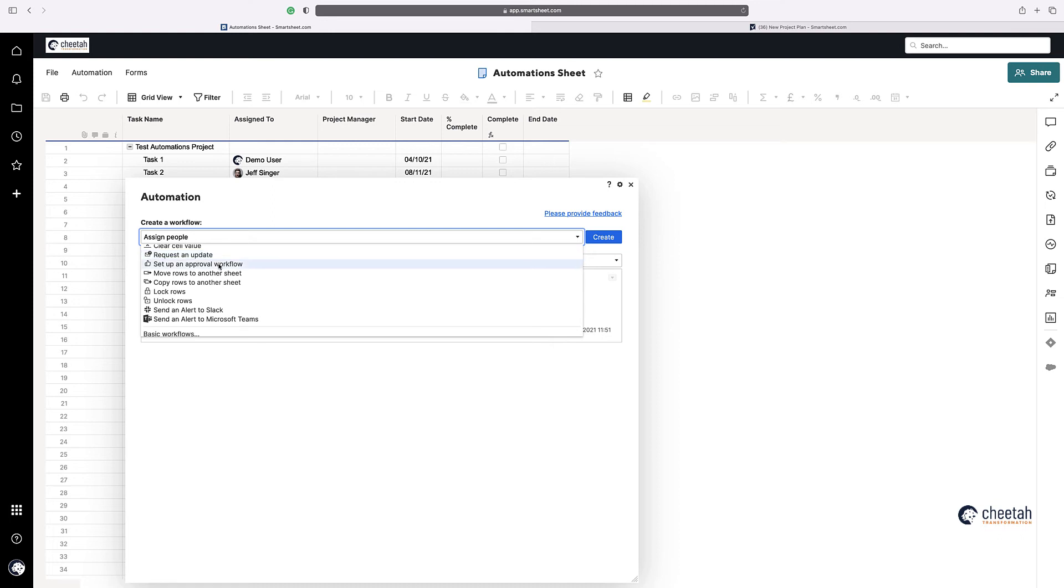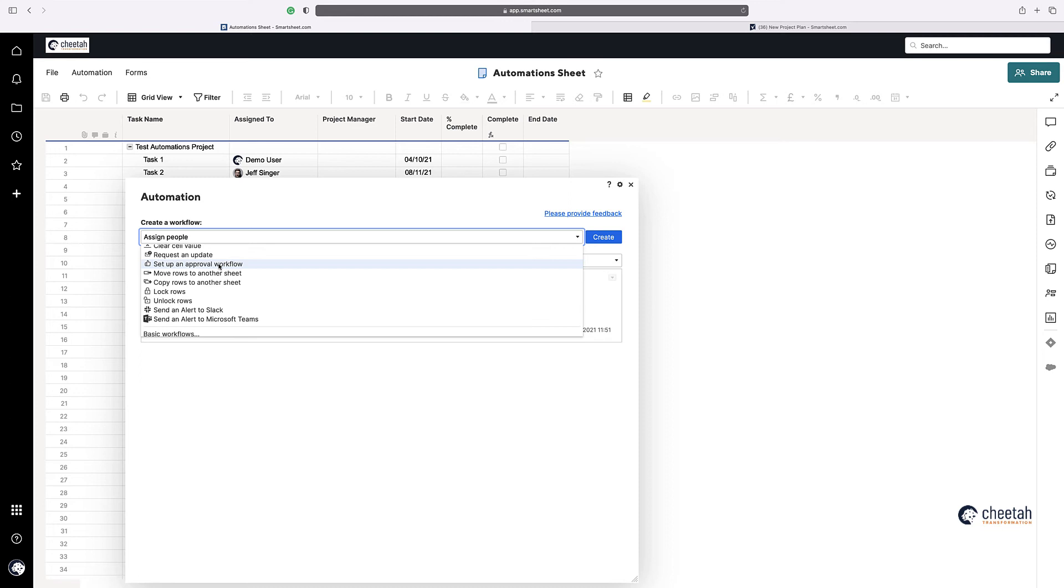An approval workflow, again, is quite good, depending on your sheet. Again, what we've used this for in the past is from an intake sheet is depending on the budget that's applied. If it's under £10,000, for example, then the approval can happen from the head department. But if it's over £10,000, then you need approval from a director. And you can actually set that workflow up there with the conditions to say, if it's less than £10,000, it goes to a head department. If it's greater than £10,000, it needs to go to a director. So, again, it's quite powerful using a condition element within the workflow creation.